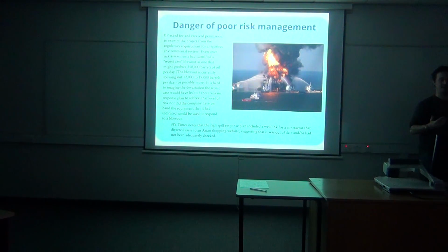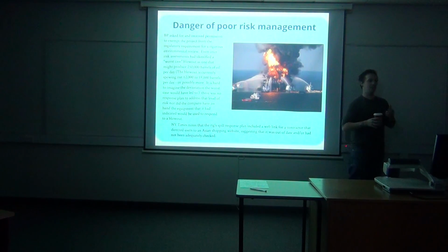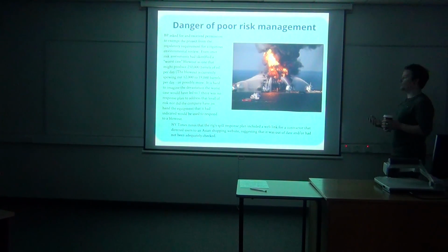They underestimated the worst case, if you like. There was also no response plan. On their risk register they said, okay, there's a risk of a blowout, but there was no plan for what would actually happen if that risk took place. And there was no equipment that it needed in order to deal with that.